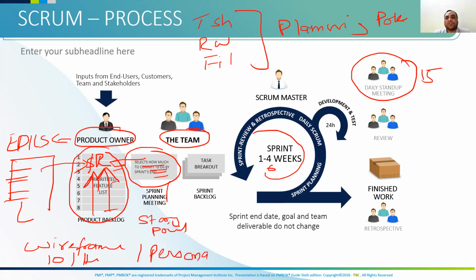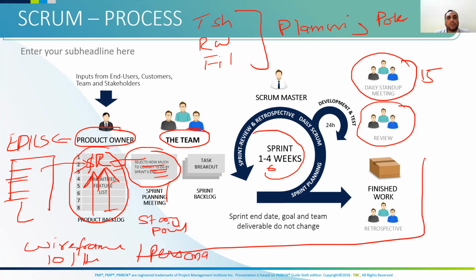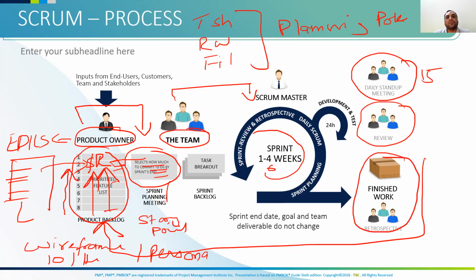Once the sprint or iteration is finished, there will be an iteration review or sprint review meeting where the team will demonstrate a deliverable. If they don't like it, they will take the new requirements and update the product backlog, and it will be prioritized. Then the iteration backlog will be created, the iteration will start, and the same practice will continue. They do not make changes in the same sprint, they make the changes in the next sprint, because they have to groom the product backlog. We are making the change, but we will check whether there are any user stories which have more priority or not. If the work is accepted, they will finalize the finished work and release it as per the schedule.